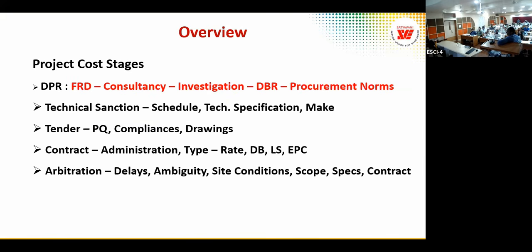Next comes the consultant. Once he is appointed, he will go for investigation. In fact, I missed out geological investigation for major projects, which is very, very important. We know the dam in Maharashtra, what is that dam? Koyna. The Koyna earthquake happened because of the lack of proper geological studies before construction of the dam. So investigation, geological studies, environmental impact assessment, environmental studies are all very important.